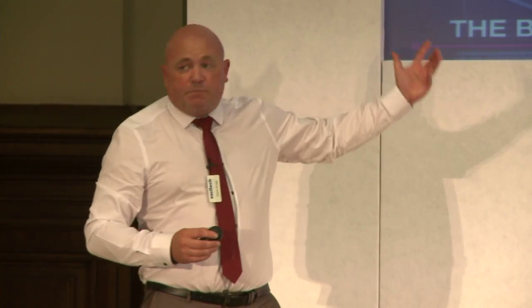It's going to start, once I've built the building, allow me to laser guide when I'm actually going to drill to put things in, because I'm doing modular build. So I can do this work while the things are being built off-site.